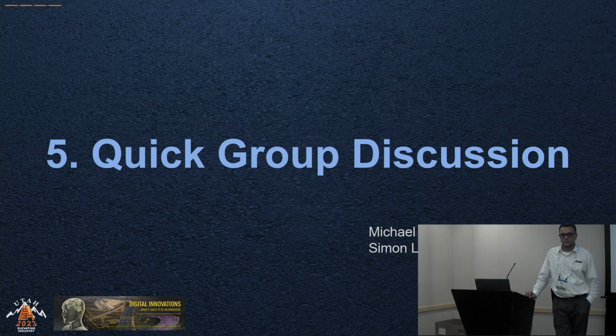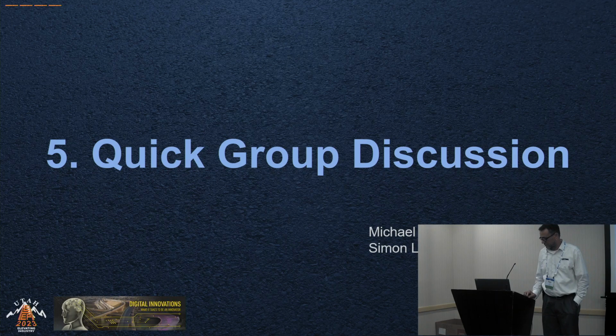These are workflows and processes that we're experimenting with live through the project. During design, we gave them a heads up and accounted for budget-wise extra time and work on the consultant side so they didn't get hosed. And probably the same thing will go on to the construction side.